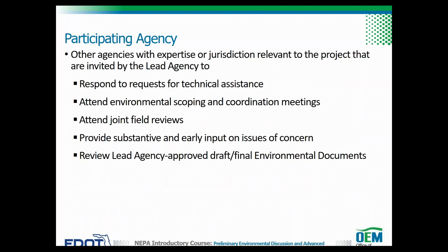Lastly, let's discuss the participating agency. Participating agencies are other agencies with expertise or jurisdiction relevant to the project that are invited by the lead agency to respond to requests for technical assistance, attend environmental scoping and coordination meetings, and attend joint field reviews. Their responsibilities also include providing substantive and early input on issues of concern and reviewing lead agency approved draft or final environmental documents.